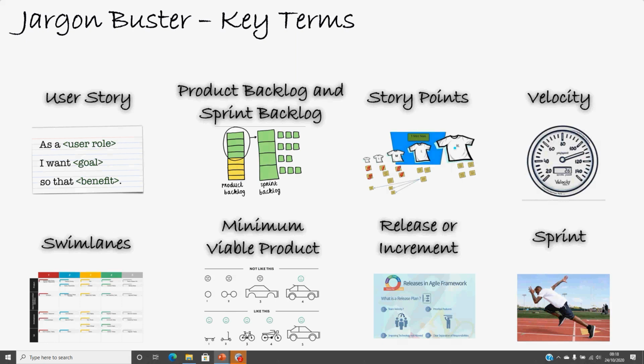You will also be able to evaluate your velocity at the end of your sprint. Once you have delivered what you have planned, your velocity is not what you planned for, but what you actually delivered. It's not that you planned to deliver 10 story points in a sprint, but ended up delivering only 6. So 10 is not your velocity. Your velocity is actually 6. That's why we are saying that it's not what you planned for, it's what you delivered.